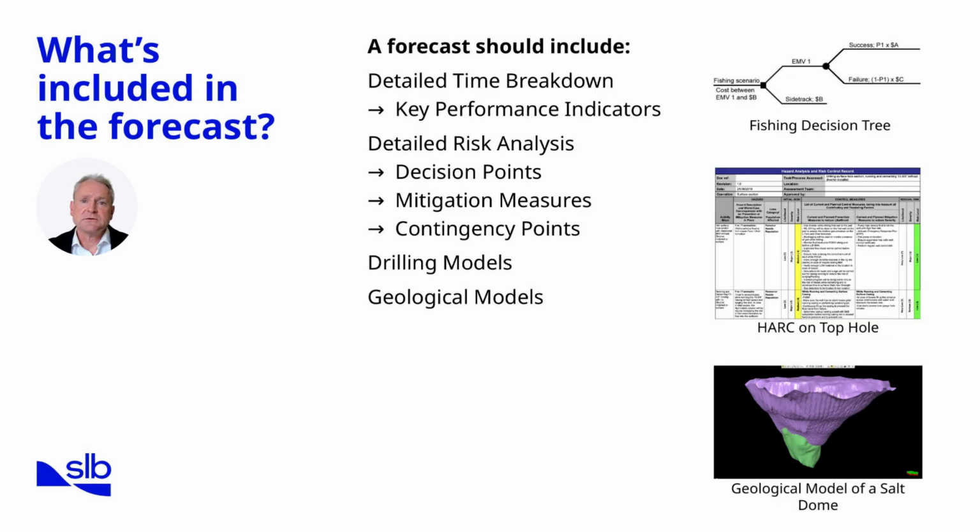A robust drilling forecast must be more than a schedule. It is a comprehensive plan that captures both expected performance and potential risks. The first component is a detailed time breakdown, which maps out each stage of operations and provides the basis for monitoring key performance indicators. These KPIs allow us to measure progress and flag variances early.